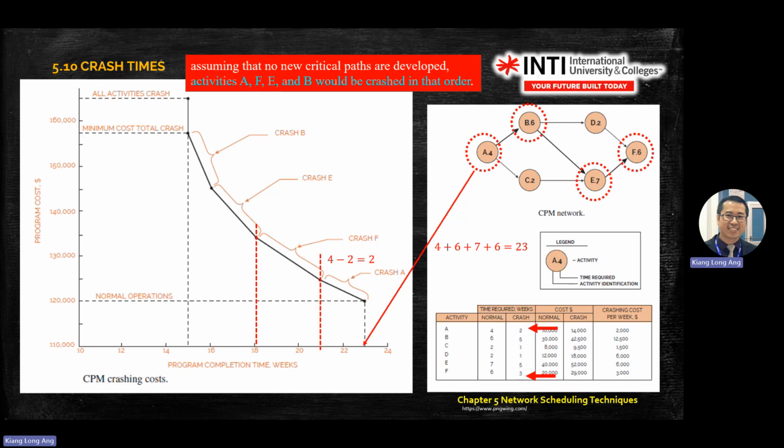So you can jump, but the textbook procedure follows the value of the crashing cost here. You can jump, no problem. Important is you pick the critical members and then put them inside your calculation. You add the four critical members here. Let's say for the four events, the four members keep crashing. Then the minimum pocket money you need for your project is this one.